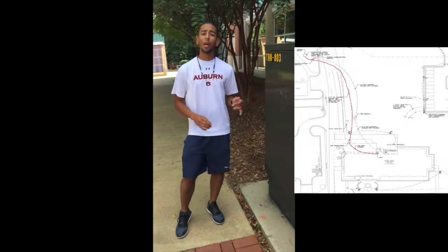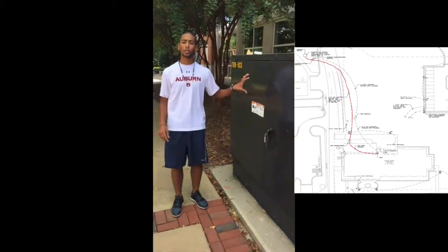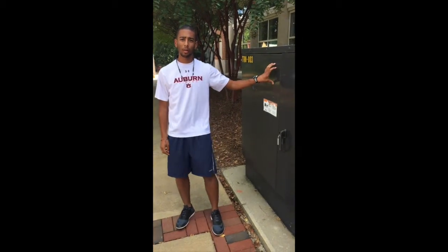The transformer, 13.8 kilovolts of electricity is flowed from the switch to the transformer. Two main scheduling issues involved would be the procurement of the transformer itself, and then the second one would be the excavating of the trench and then laying of the conduit from the switch back to the transformer.